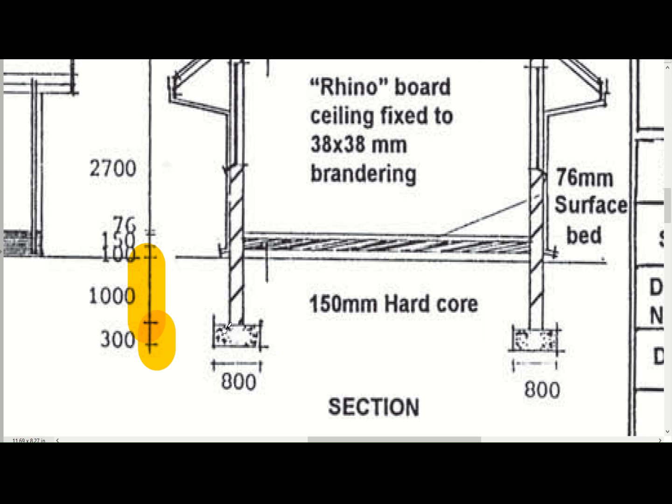Okay, so whenever you do your measurement in your bills of quantities, your excavations will be in cubes and not in meters like what we're measuring now. Then you will times it with your total length, that's 36 meters that you measured, times 800 mils times your height.